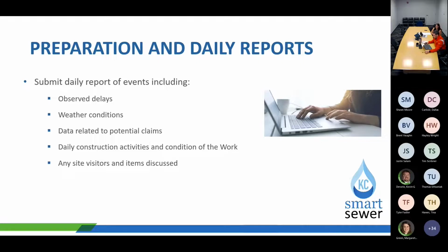So, the items that can happen on a daily report, you always have your 9 a.m. weather. I always encourage the RPRs to do it at 9 a.m., just as a 9 a.m. check. Check the weather channel, check your car, whatever the case is. It actually has on there what type of weather it is. It's 68 degrees and it's partly cloudy. All right, weather conditions are good.